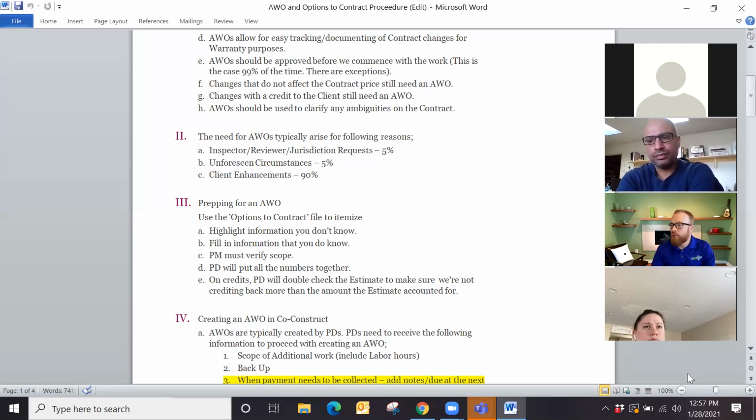And we know that the majority of those unforeseens typically take place, I think that's what Jack was alluding to, either at permit review, at inspections, or during demo. That's the bulk of these that take place. So I would agree with Jack. Maybe we either put them globally as not included, or in those specific categories under planning on the contract or under demo.